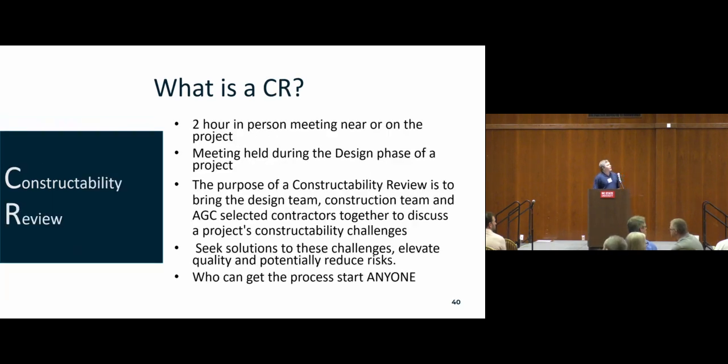So, constructability review. I've also been in probably a little bit fewer of these, a 2-hour in-person meeting near or on the project. It's a meeting held during the design phase of a project. The purpose of a constructability review is to bring the design team, construction team, and AGC selected contractors together to discuss a project's constructability challenges.